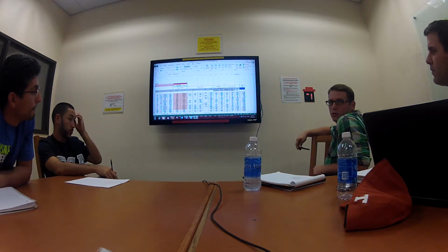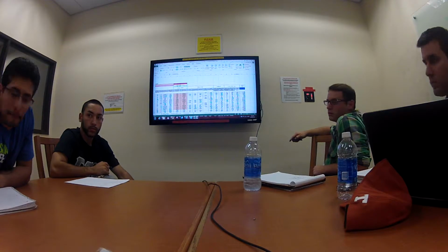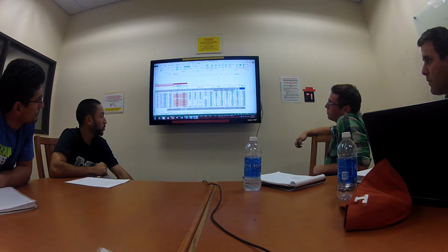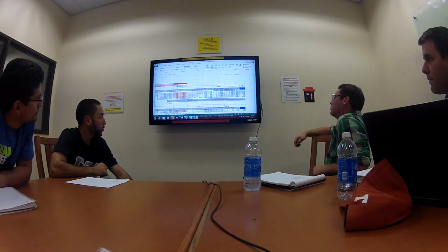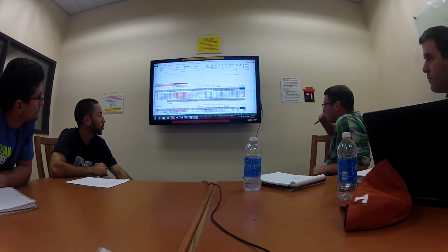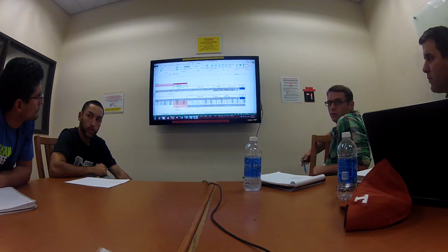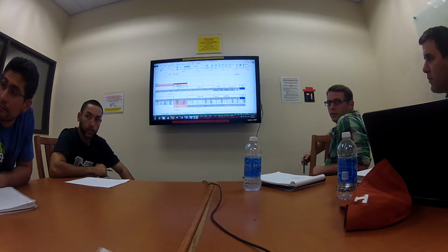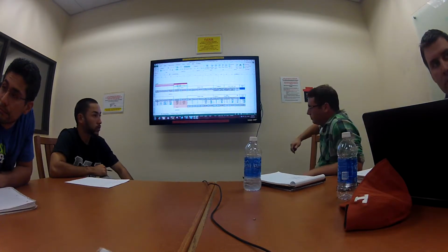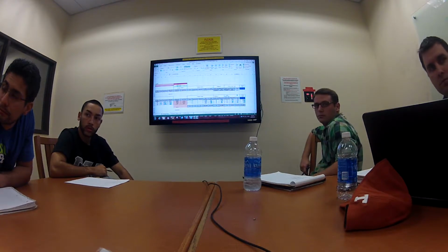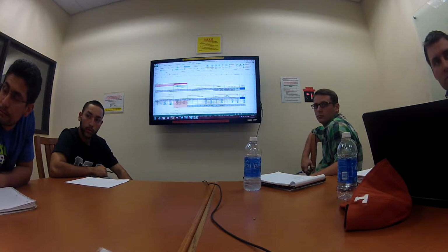Second, it had, what do you call it? An incentive or whatever. Scroll down to it, it has the name of it. It's an additive alternate. So they could choose to do that or not, and that makes this more complicated too, because they base the selection of your bid off of your total price with the additive alternate. That's what it said in our bid documents.